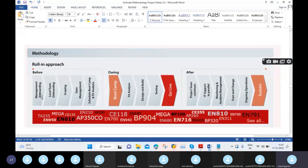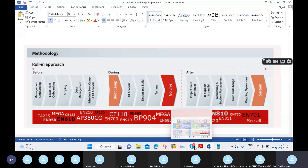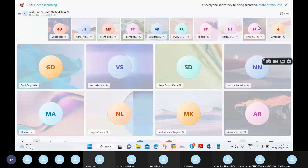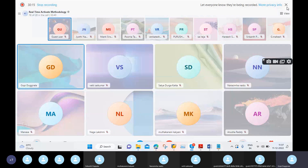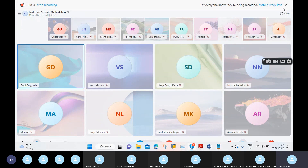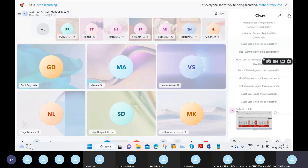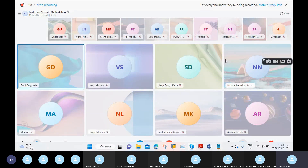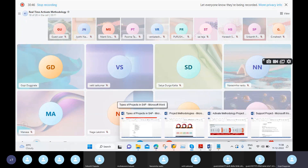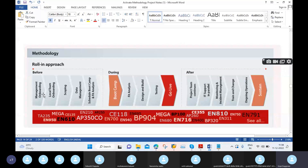Looking at the 'Before' activities — things we must do before the project starts — the first step is management onboarding. Generally in any project, the organization is split into two types: business side and IT side. So management onboarding means identifying who the highest management is from both the business side and the IT side.